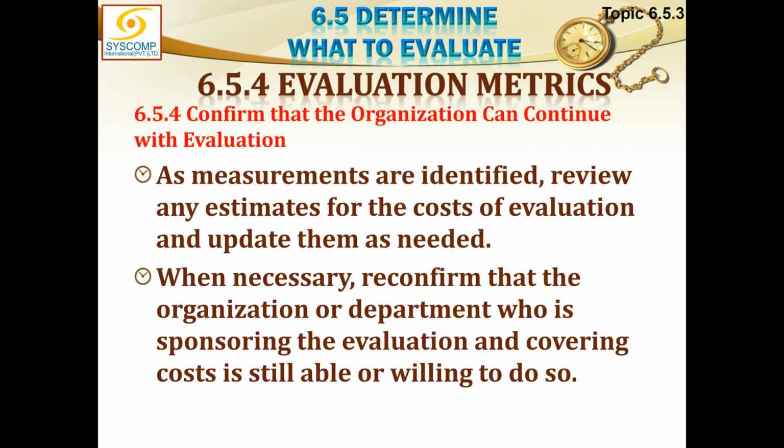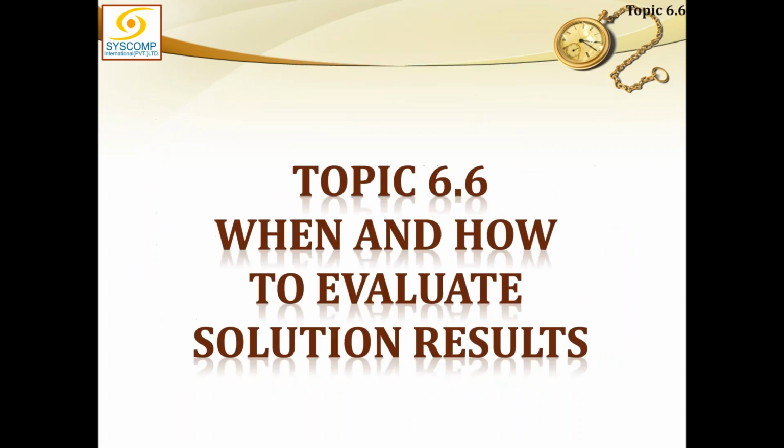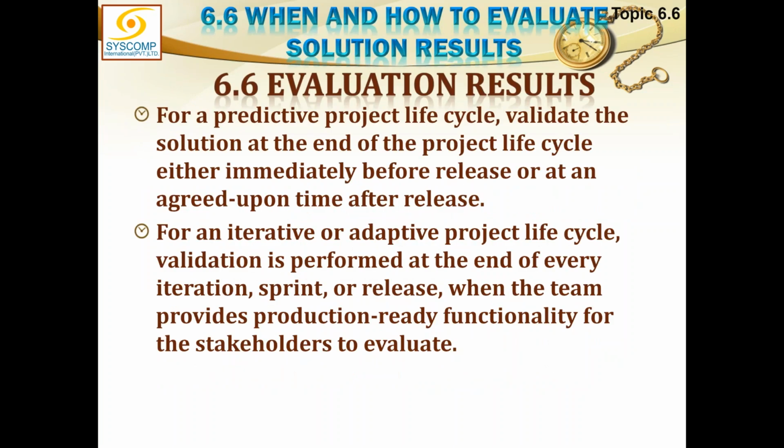Then confirm that the organization can continue with evaluation. As measurements are identified, review any estimates for the cost of evaluation and update them as needed. When necessary, reconfirm that the organization or department who is sponsoring the evaluation and covering costs is still able or willing to do so. Next topic is when and how to evaluate solution results.